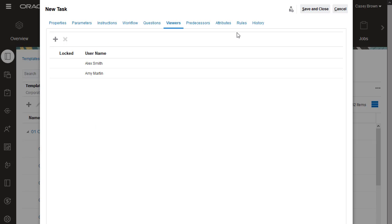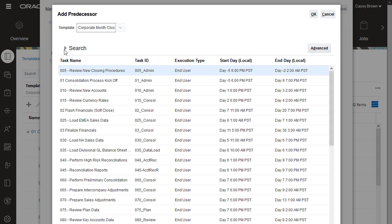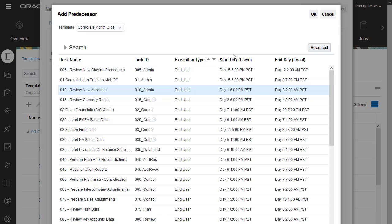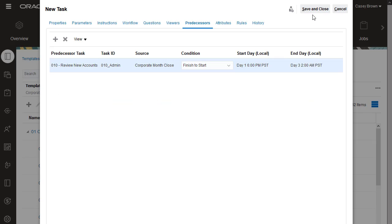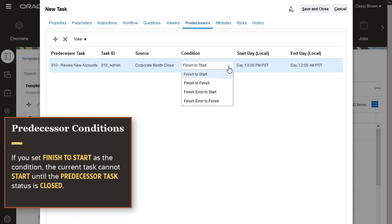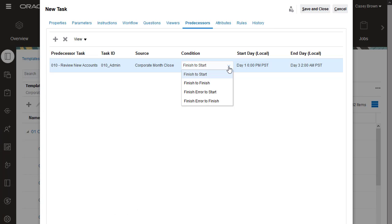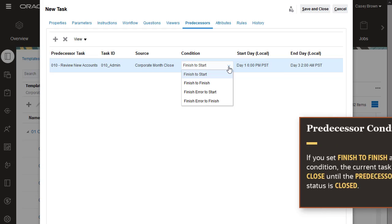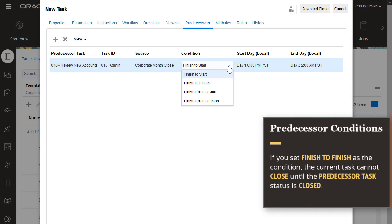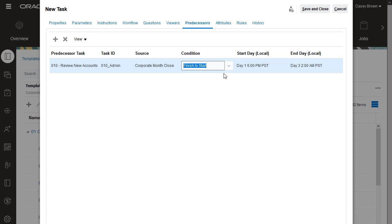You can specify a predecessor for the task. I'll select the Review New Accounts task as predecessor. The current task will not change its status from Pending to Open until the predecessor task is in the specified condition. If you select Finish to Start as the condition, the current task cannot start until the predecessor task status is closed. If you select Finish to Finish, the current task cannot close until the predecessor task status is closed. I'll select Finish to Start.